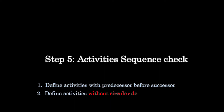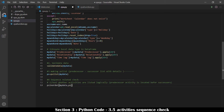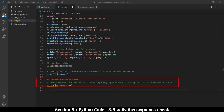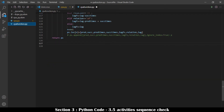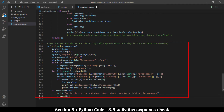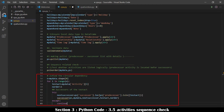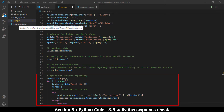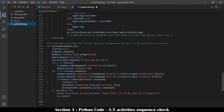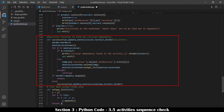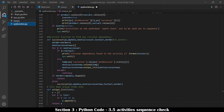To help critical path analysis run straightforwardly, it is necessary to arrange activities in sequence row after row on the worksheet and without circular dependency. First, activities are arranged so that predecessor activities are defined before their successor activities — deviation is checked by calling the ps_in_order function in cpa_function.py. Second, a predecessor should not be taken as a successor of the succeeding activity to avoid circular dependency, checked by calling a successor function in cpa_function.py. This successor function runs recursively and calls another function, unique_list, to sort out unique activities from successors of each activity.